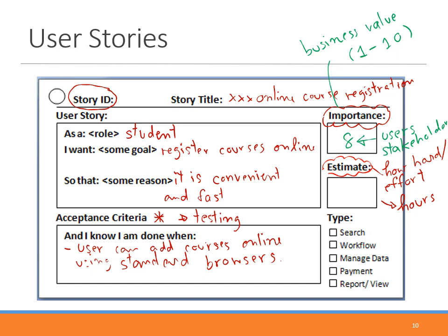The reason it is said here as estimate, you see, sorry, it should be yellow, right? Because it's the way that we as a development team need to estimate together. We don't know for sure, but from experience you will be able to estimate how many hours you think this online registration story would take to complete. You might say 5 hours, okay? And what type of story it is, a kind of part of the workflow, something like this, okay? So this is an example.